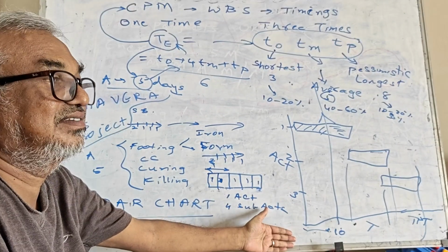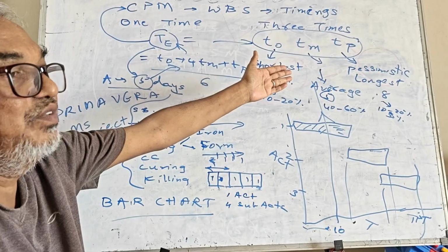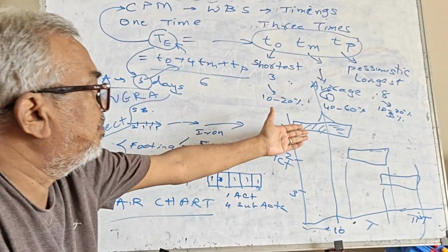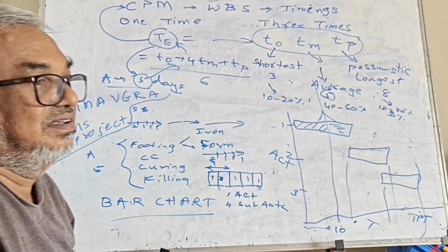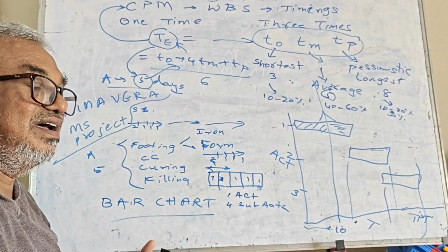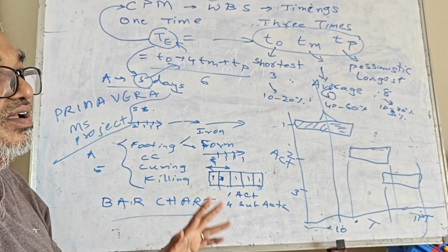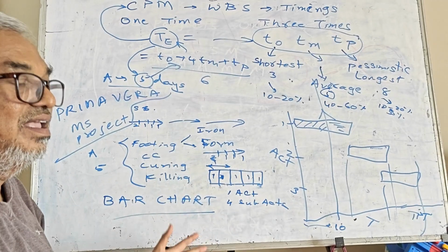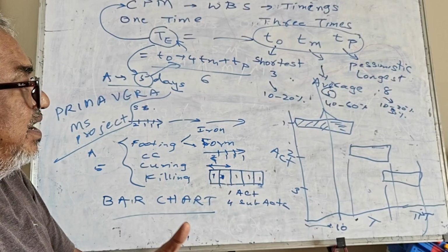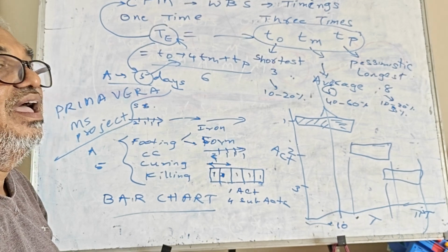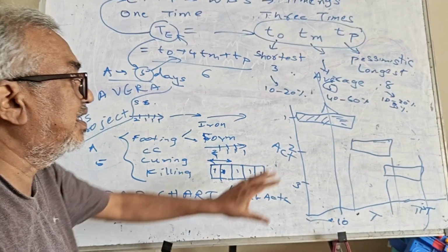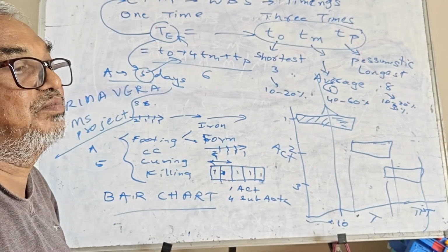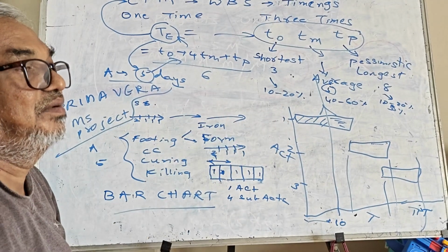This line will give you the controlling line. It will clearly say what is on the left, what is on the right, whether activities are completed or still to be completed. There are 3 types: are they on schedule, are they behind schedule, are they ahead of schedule. So this is exactly what the bar chart will give. This is the most important beauty of the bar chart.